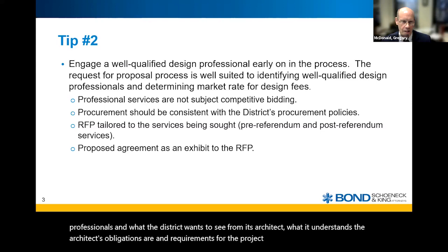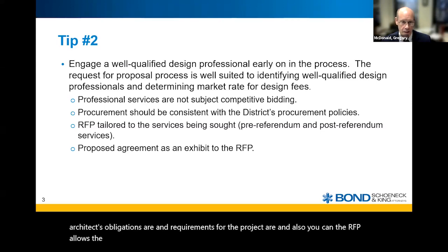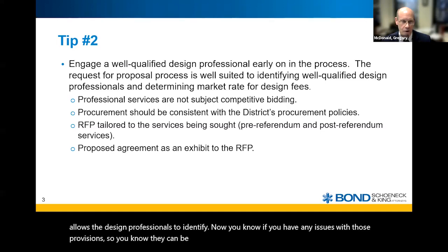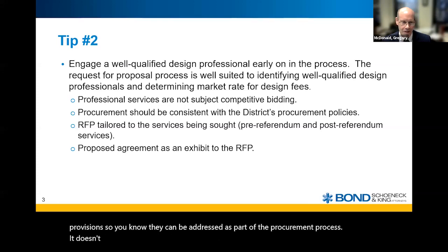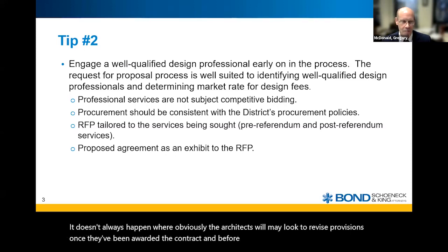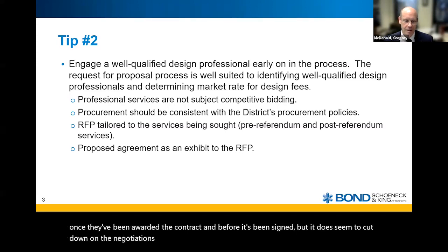The RFP also allows the design professionals to identify now if they have any issues with those provisions, so they can be addressed as part of the procurement process. It doesn't always happen, since architects may look to revise provisions once they've been awarded the contract and before it's been signed, but it does seem to cut down on the negotiations of that design agreement.